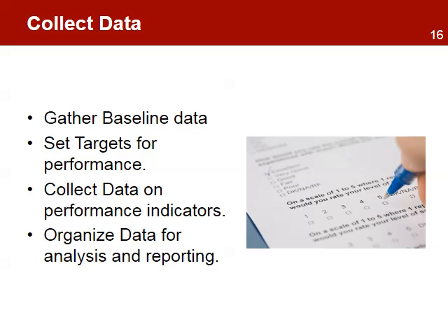The next step in the monitoring process is data collection. The performance measurement framework identifies the type of data, the source of the data, the frequency to collect the data, and who is responsible for collecting data. In this step, the project will collect baseline data to determine the targets the project will use to measure performance. Collecting data will occur at various intervals during the project, depending on the type of data.